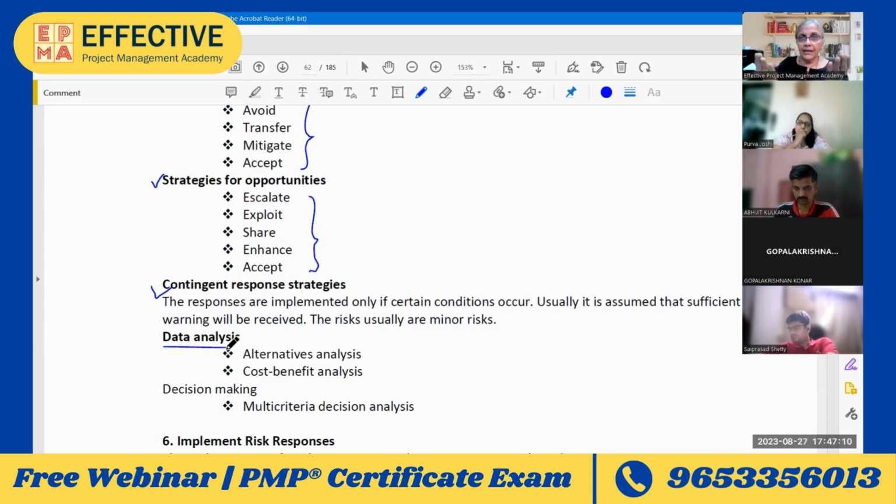This is the analysis that I told you, what-if analysis, or alternative analysis. I might have two more resources, or what happens if the activity actually gets delayed, or can I have anything else? Like, okay, can I buy out the product of that activity instead of having that activity? So these are the alternatives. What-if analysis and cost benefit analysis.